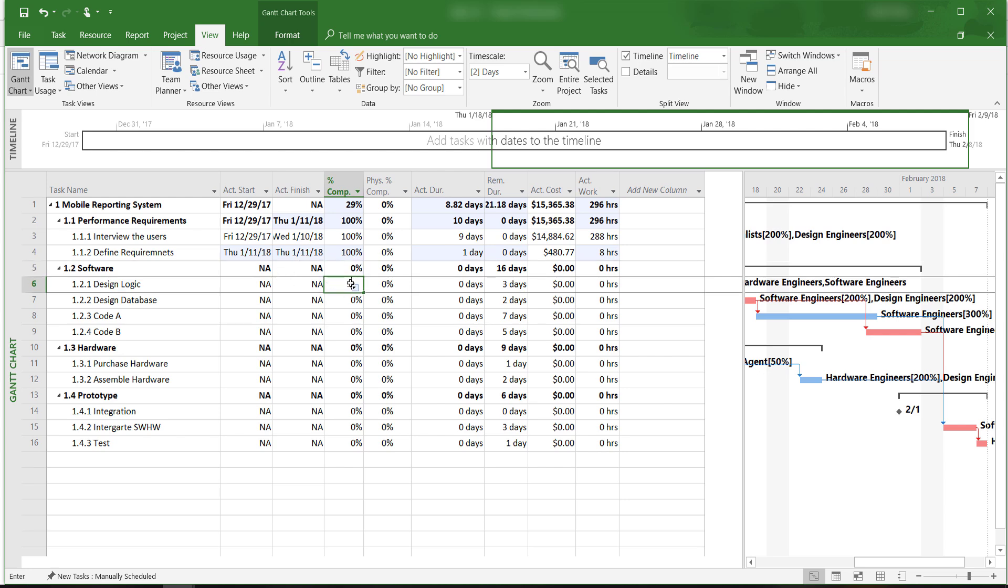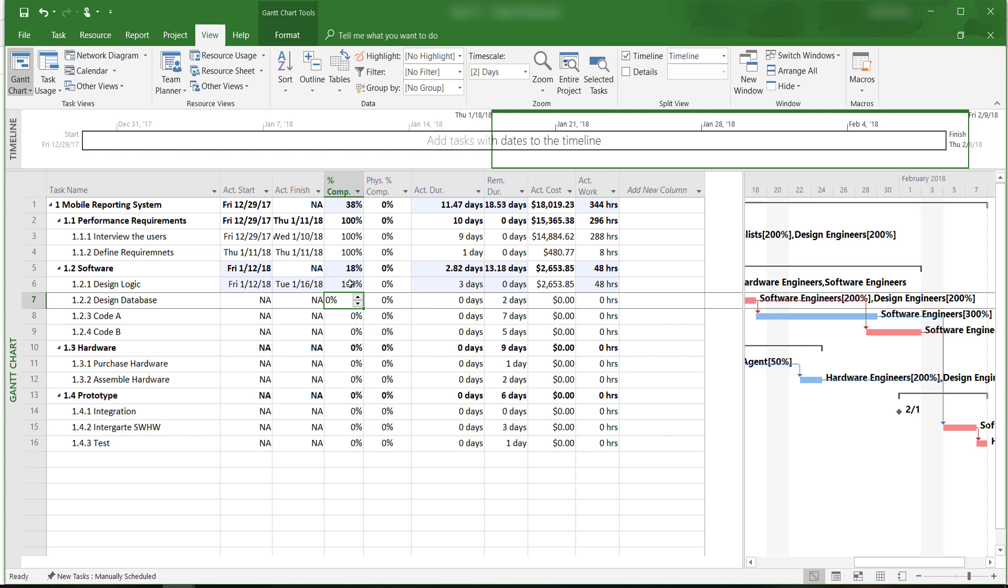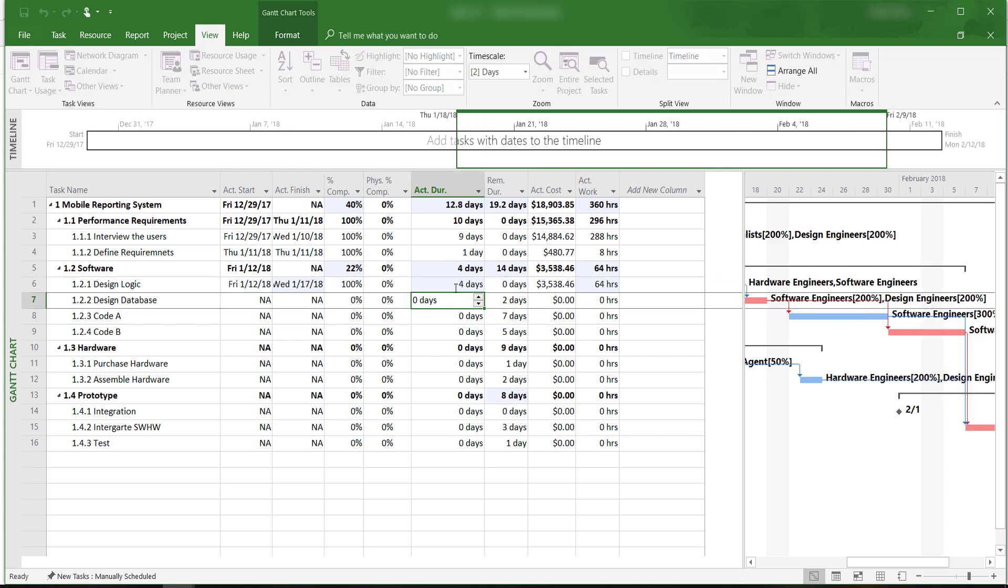Let's say that design logic has been completed, but we run into some problems here as well. And instead of taking 3 days, it actually took us 4 days to complete.